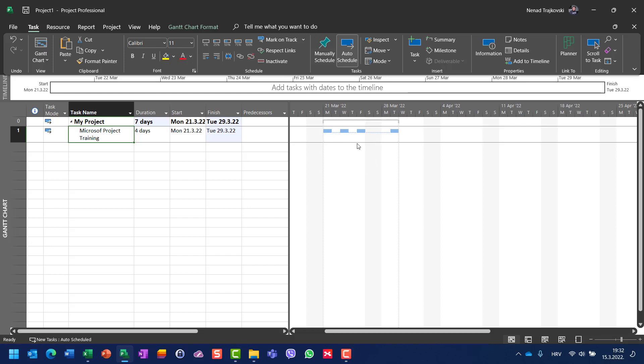So I have my task which has four days duration, but it will not start on Monday and finish on Thursday. Instead of that, because I split it, it will start Monday and be finished on next Tuesday.